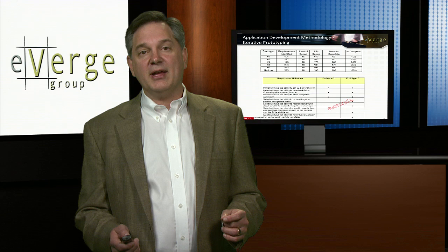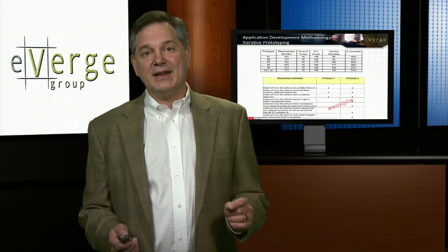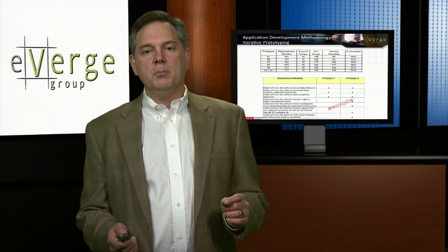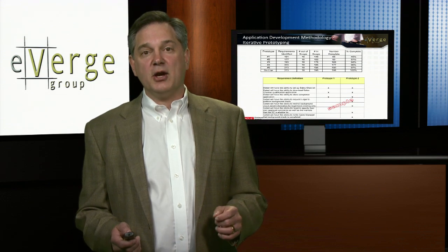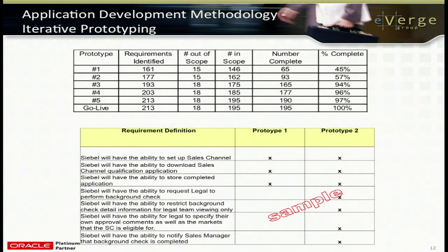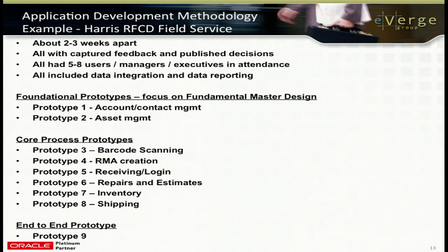Another thing we like to cover at the beginning of every prototype is shown in the second table — an excerpt from one of our CRM clients. We kick off these prototype meetings with a handout showing every single requirement documented so far, and whether that requirement has been fulfilled in this particular prototype. The concept is: you see the application develop before your eyes.